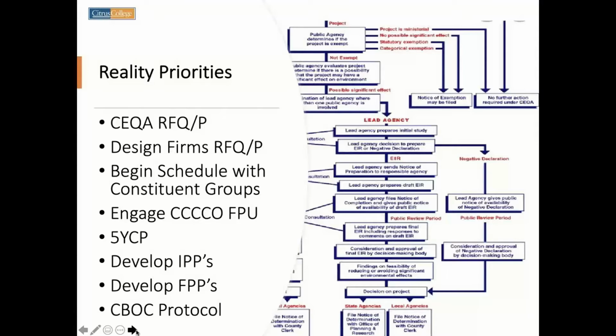The next thing that has to occur when you want to bring your project before the Department of Finance, it has to go through another formal process, and that's called an FPP. That is called a final project proposal. So just to give a little bit of insight, the work that's entailed in putting one of those together, separate outside consultants almost 100% of the time have to be engaged in order to do that.